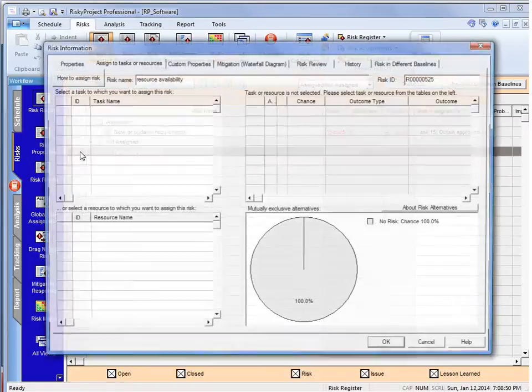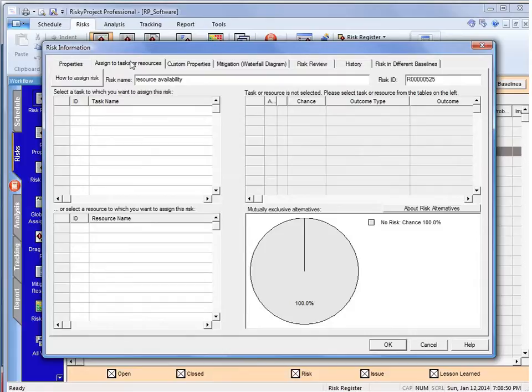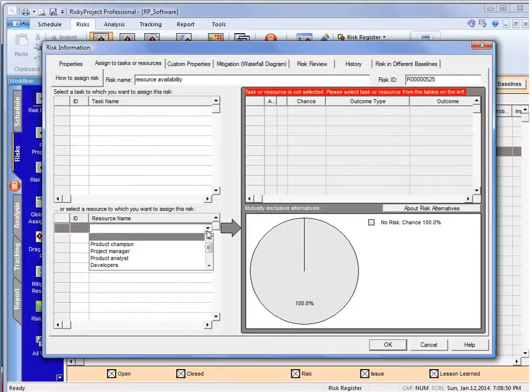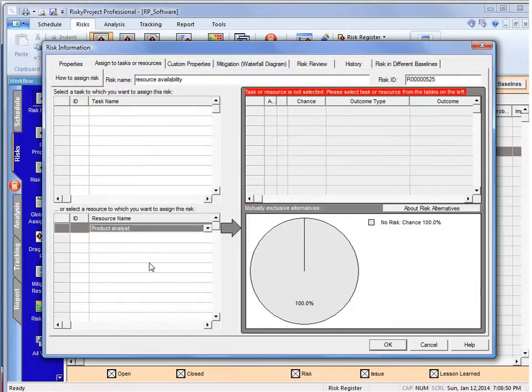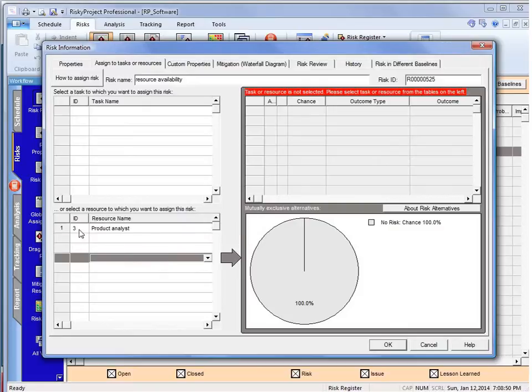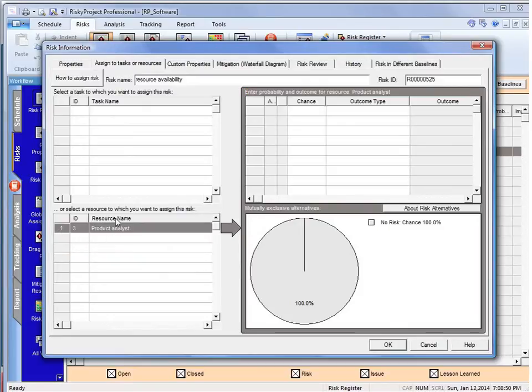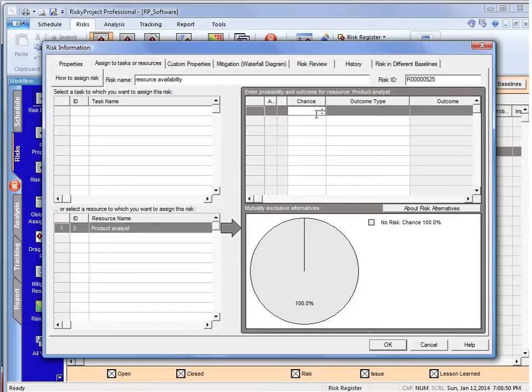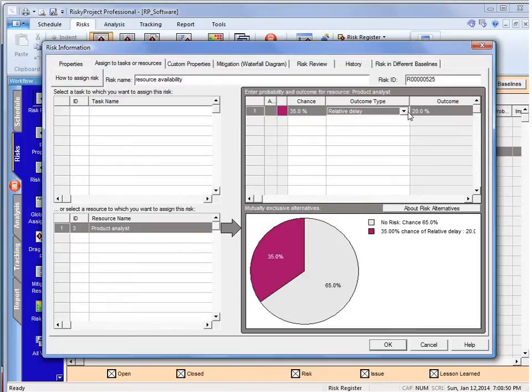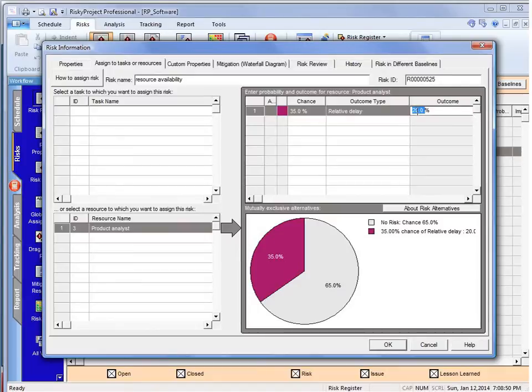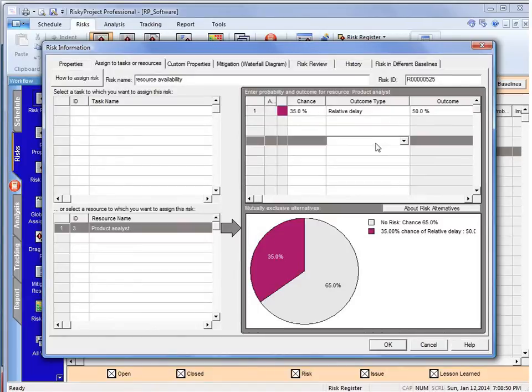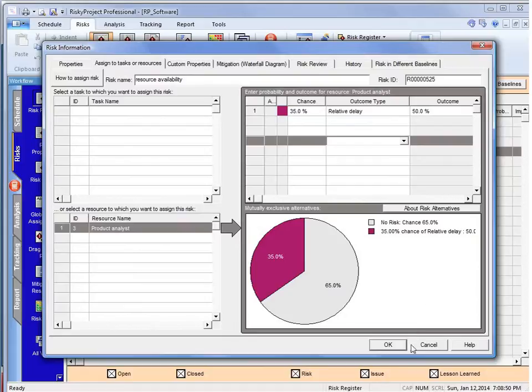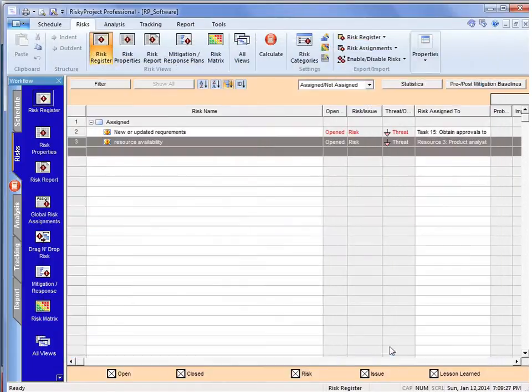And the same thing, we can double-click on that, go to there, and we can actually select. And perhaps our product analyst might be working on another project, and we think that there's going to be a 35% chance of that occurring. And if it occurs, we're going to have a relative delay, but this is actually going to have a bigger effect. It's going to delay all of the activities that this product analyst is assigned to by 50% if he's not available due to other commitments.